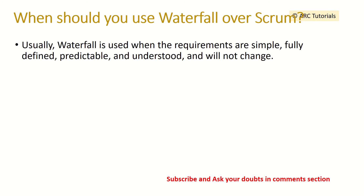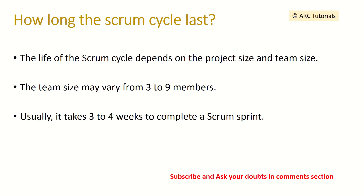How long does a scrum cycle last? A scrum team can range from three to nine members. A sprint can last anywhere from two to four weeks — the standard is typically two weeks but can go up to three or four weeks.